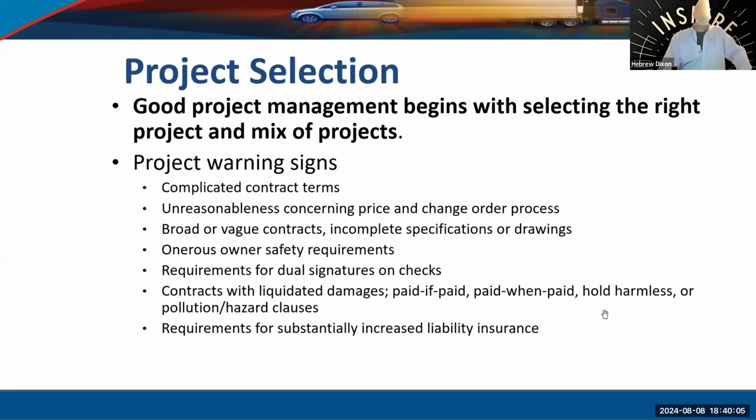We talked about that. And some of these things we talked about, they could be mostly challenged because it's costing you money. Well, do I have enough in it? I could be all right. Or I know I got a little fat, so I'm going to buy out the sub a little bit more. I may be able to figure out how to pull some money out of the project, or my buyout, meaning what I bought the project out for based on what I estimated. It could be a delta. It could be a positive for me. So there are a lot of nuances that happen in that space, but you want to make sure that you are covered, any given Sunday, if you will, to make sure you're protected.